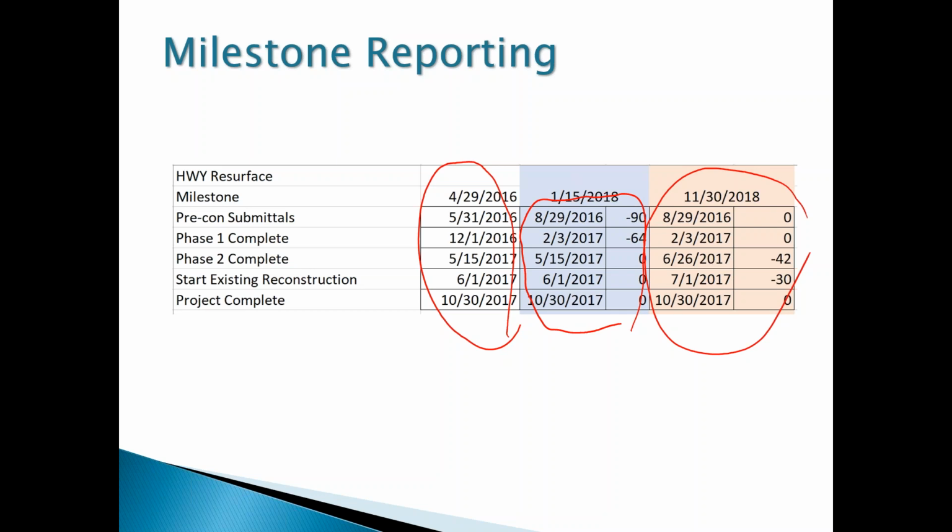You can run the diagnostics once again to make sure that the schedule is somewhat reliable from a technical standpoint, in other words, that they're following good critical path techniques. You're also keeping track of the changes that are being made. Like I mentioned, that's a simple report to run. But this is the one that's going to really tell you. After I fill out my spreadsheet each month, I can go run my changes to see what they were changing to bring this back into line.